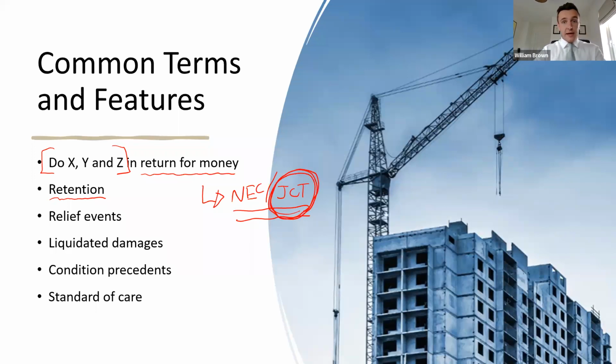It has wording to the effect that the retention money held by the employer always belongs to the contractor, and the employer's interest in that money is fiduciary in nature, which is a fancy legal way of saying that they're obliged to protect it, but it is not theirs.